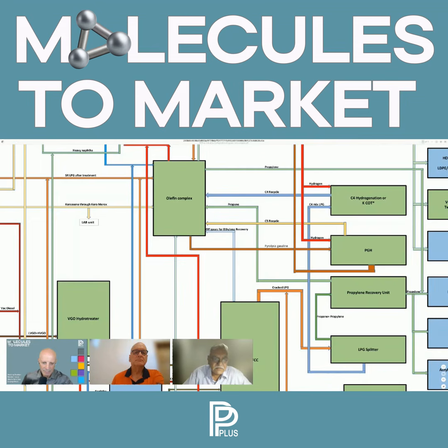Thank you very much. So the way to build a project in India could be that your group should actually be interacting with some big promoter like Ferrostaal, somebody with deep pockets. Now you can do all the configuration, detailing, help them line up the licensor, develop a detailed feasibility report, have the project viability established, and then approach the Government of India and say, I'm going to invest so much money, you give me land, you give me A, B, C, D, and that's it, I'm going to do the project for you.